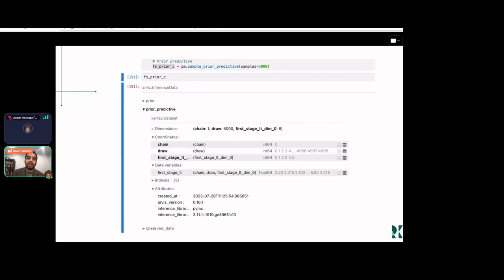With a prior, you end up with a bunch of samples. These are the samples for the prior predictive. Samples were helpful because then I could not just have one number, but have the distribution of the different values that possibly could have happened, again, prior to incorporating information.